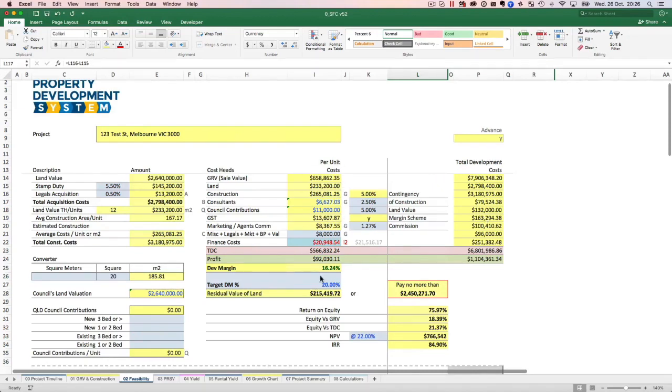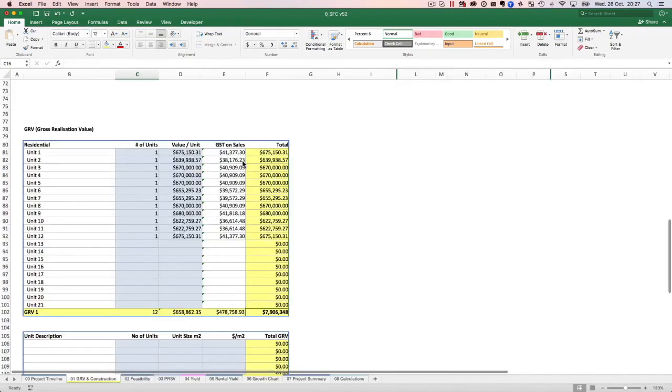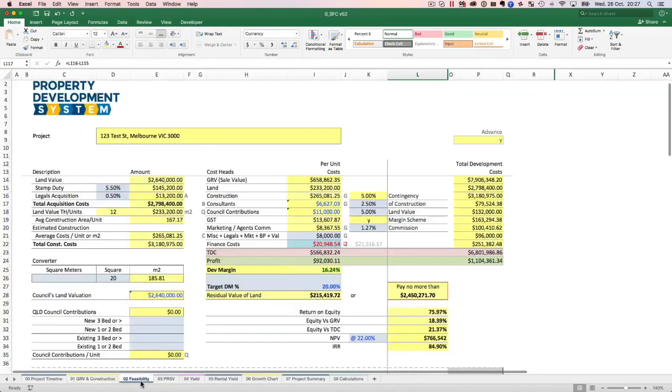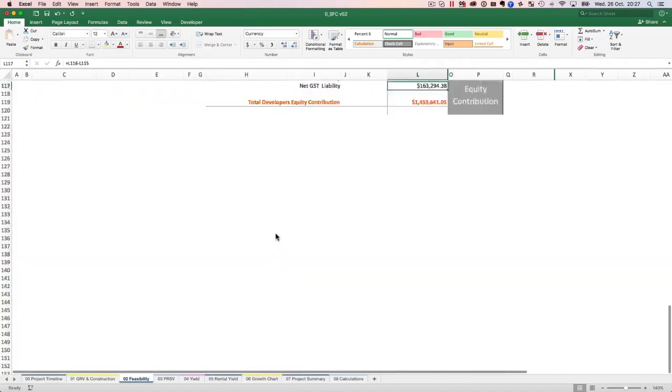So when I'm calculating my development margin, I only put in the GST that'll cost me more than what I can claim. So that is why you can't put $20,000 or $40,000 in GST over here as it shows here, because I've been claiming back on all the expenses that I'm making, whether it's to consultants, to construction, on anything. So I'm claiming all that back along the way.